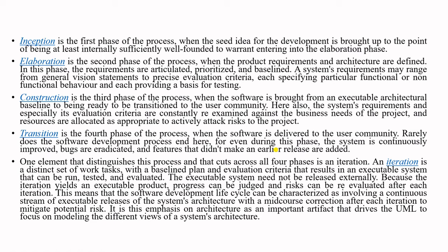Advantages of the waterfall model. The waterfall model is a simple model which can be easily understood and is one in which all the phases are done step by step. Deliverables of each phase are well defined, and this leads to no complexity and makes the project easily manageable. But there are some disadvantages of the waterfall model also. The waterfall model is time consuming and cannot be used in short duration projects, as in this model, a new phase cannot be started until the ongoing phase is completed.